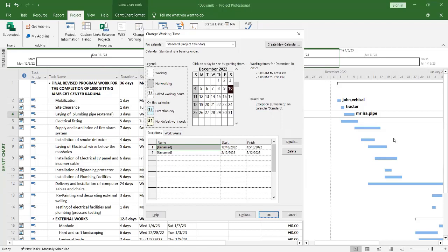There are some days, for example, tomorrow, Monday, is a public holiday, right? So you can set it as a non-working day. So even your working days, like the way we set non-working days as working days, on the exceptional side, you can as well set your working days as non-working days.